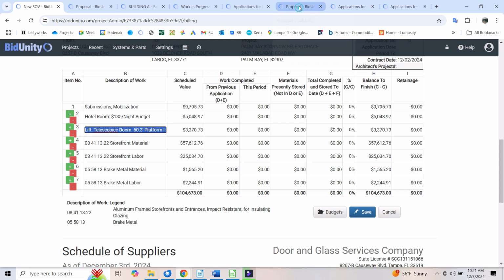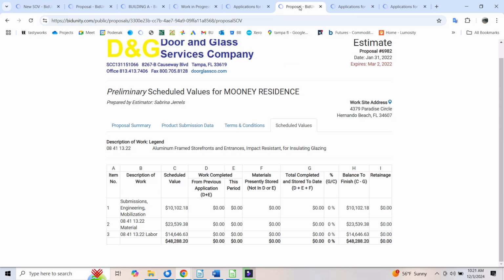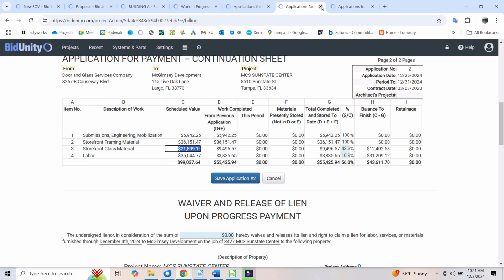It's very important to think about the composition of this in a smart way ahead of time, just recognizing we have really two primary goals. One is to structure it in a way that matches our anticipated cash flows and expenses. And number two is to structure it in a way that protects the company from potential unfair resolution if we end up getting into a problem in the course of our performance.